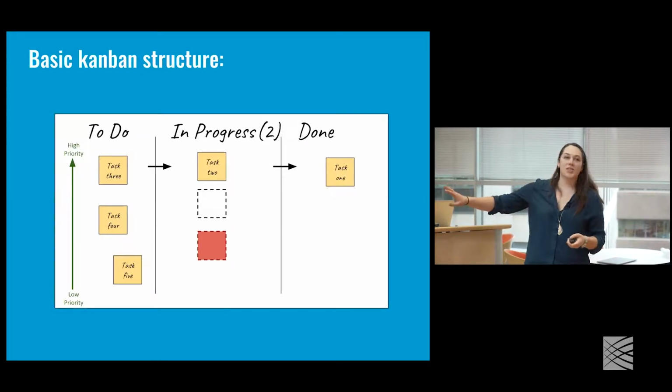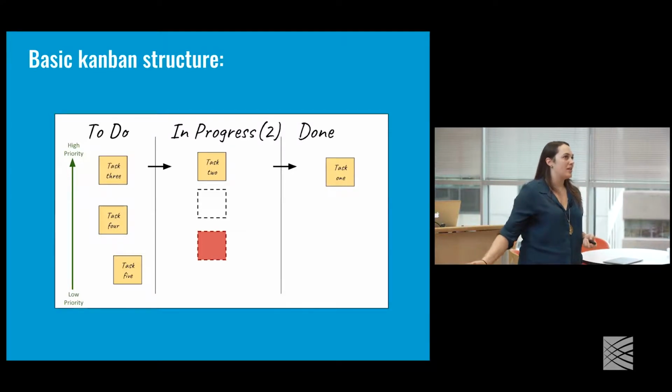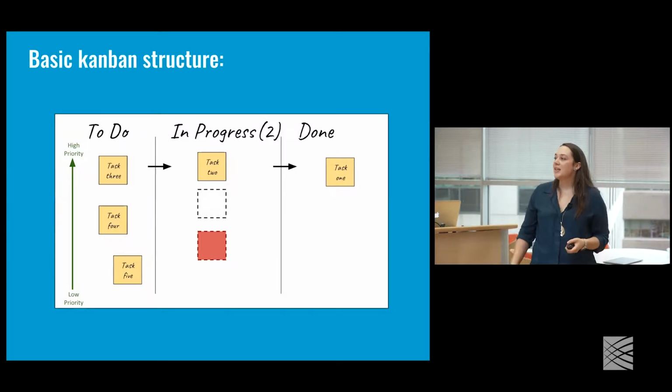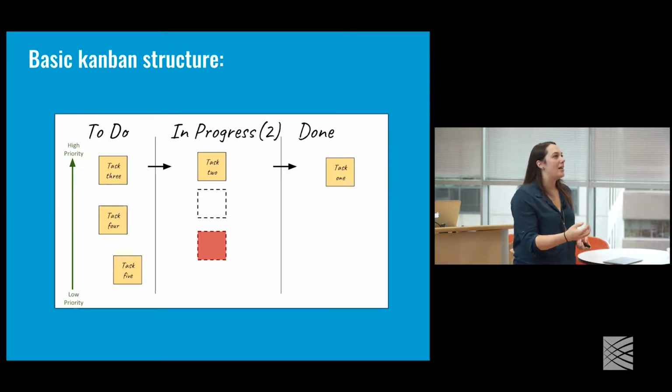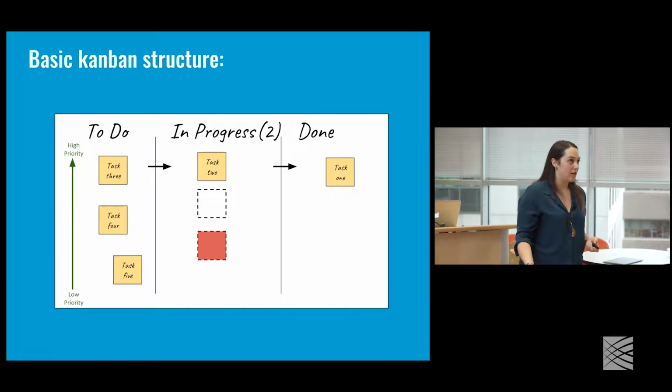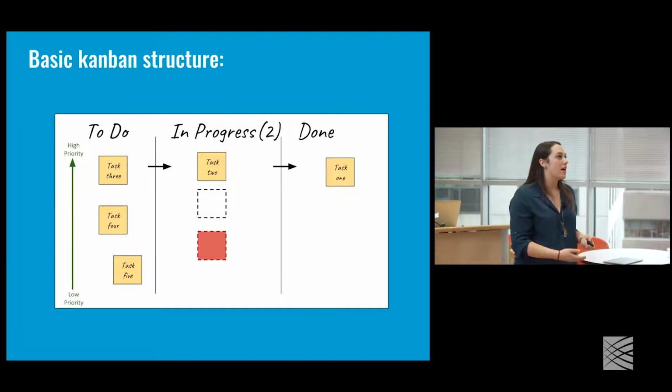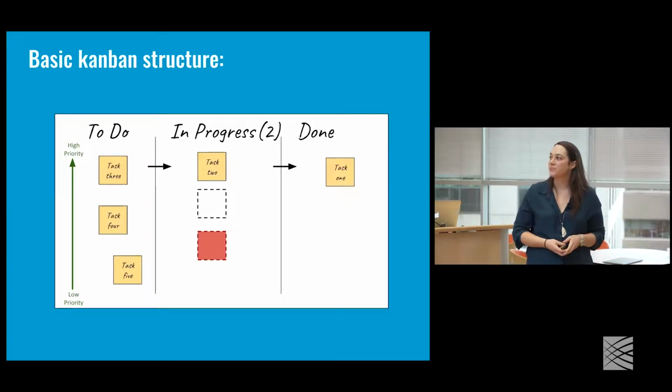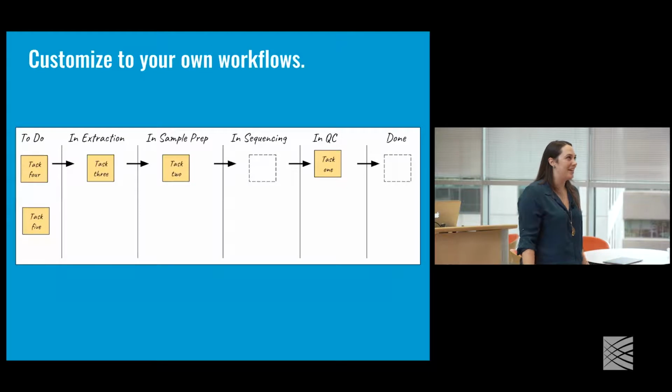And this is just the example. You can set work in progress limits based on whatever is going to work best for your team. But again, the idea here is having the conversation around why can't this thing in progress keep moving? And in that case, perhaps that's a place for the project manager or the laboratory manager to focus their efforts on removing that obstacle.